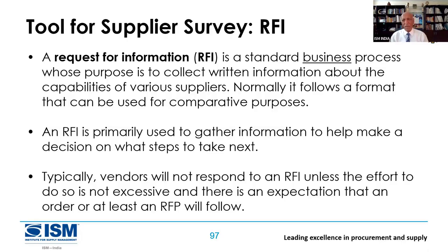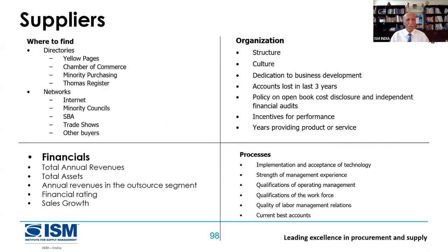But if you are setting expectations, guys, the purpose of RFI is to shortlist. And then those who are shortlisted, the RFP or RFQ will follow. So then people may come back. If you're just saying, can you send me this information? The guy will say, I'm going to spend a whole day, and I don't know whether I'll get business or not. So at the end, you can say, guys, the purpose of this is to evaluate the market. And those who meet our expectation will get the RFP. So then they know very well there's a carrot. So they will work for you.